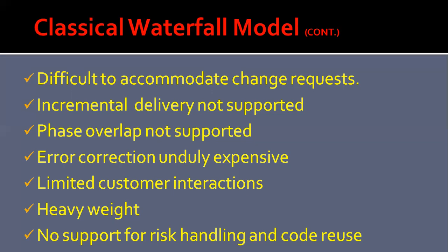The next important cause is that error correction is unduly expensive. In the waterfall model, validation is delayed till the complete development of the software. As a result, the defects noticed at the time of validation incur expensive rework, which results in cost escalation and delayed delivery. That is another major cause. Next, limited customer interaction. This model supports very limited customer interactions.